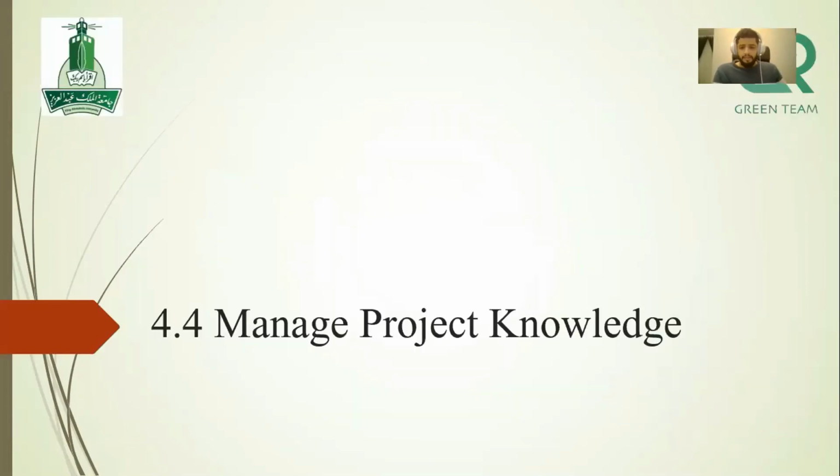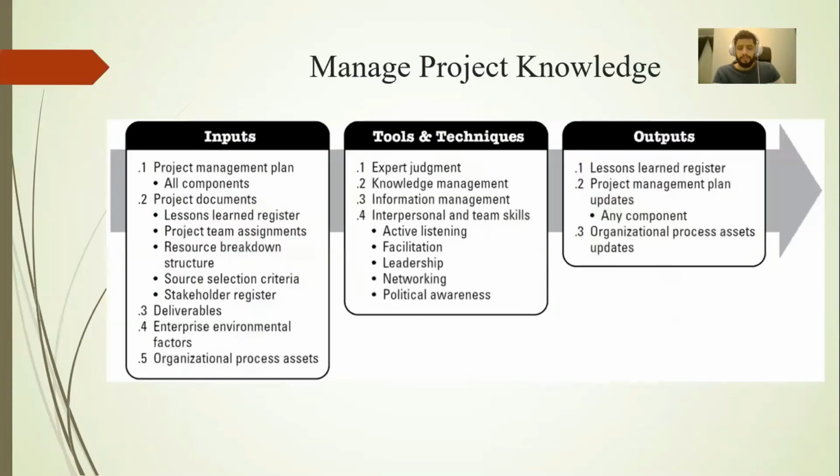Manage project knowledge has inputs of the project management plan, project documents, deliverables, and so on. The tools and techniques are expert judgment, knowledge management, and information management. The outputs will be the lessons learned register, project management plan updates, and organizational process assets updates.